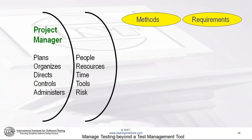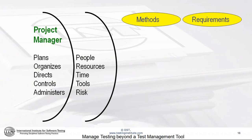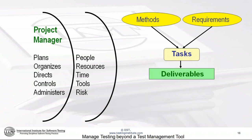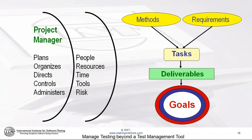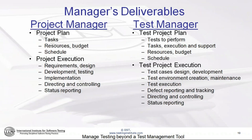When we look at how projects work, project managers plan, organize, direct, control, and administer people, resources, time, tools, and risk to bring together a set of methods with a set of requirements into a set of tasks that when completed produce a set of deliverables that in turn end up satisfying the goals. The secret to effective project management is to go backwards: start with the goals, identify the deliverables that will achieve those goals, then identify the tasks that will bring those methods and requirements together to produce those deliverables.